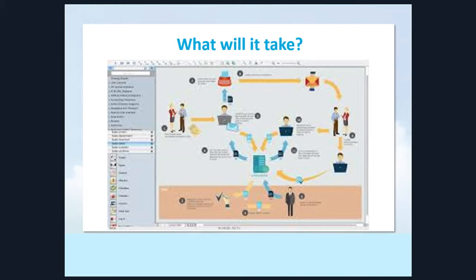In a lot of planning, you may have a variable that says, we need to go find out what services are available to this new office. And that will then dictate what we can do there. And that will then dictate what those costs are. So if you can't wait to have all the pieces worked out into an absolute plan, you'll have a branch point in the plan that says, go review this based on X, then make decision Y. And so you want to lay those plans out.